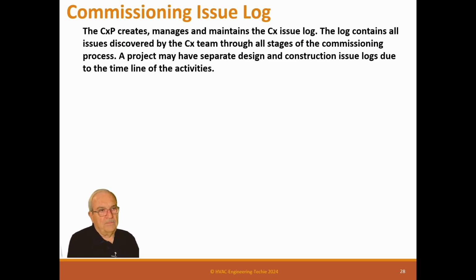And sometimes the designers don't want any issues of the design being given to the contractors. Some contractors may be anxious to use that data to try to get changes later on. So we try to separate the two. And besides, the design is normally done 4 or 5 months before we get into construction. So we do the design review first in one issue log and issue that, and then do another for the contractors later on.